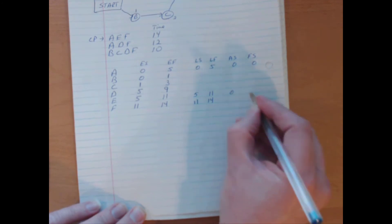So my thinking will have to come with activities B, C, and D. Because they will have some slack. So I can even go further and say no activity slack, no free slack for A, E, and F. Anything on the critical path. I just make my life easier. Just knock off the low-lying fruit, if you will, or pick the low-lying fruit and just move on to the stuff that really requires thought.